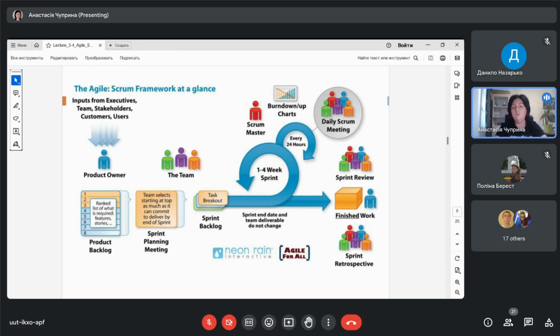It means that all the requirements cannot be equally important. So we have the most important functional requirements and the less important. Okay, that's clear. The most important functional requirements we start to develop in the first and second sprints, and requirements with less importance we keep for the next sprints, for the latest sprints. You will do the same.